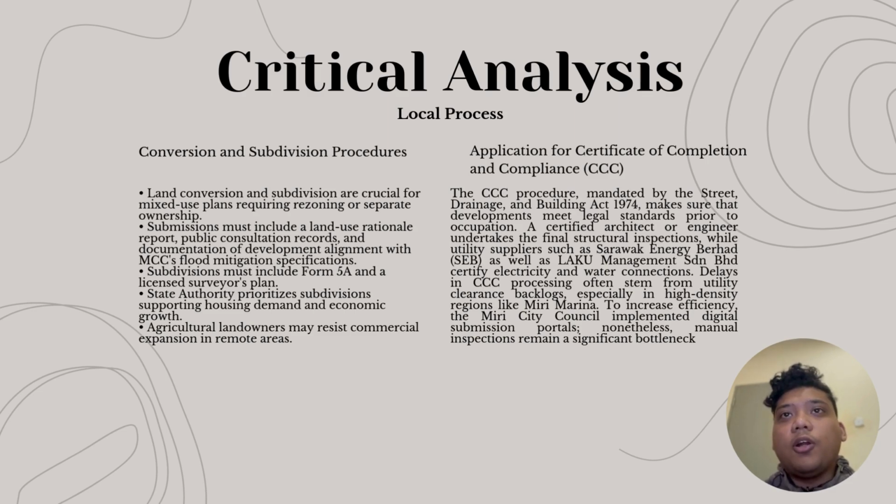And finally is the application for the Certificate of Completion and Compliance, where this procedure is mandated by the Street, Drainage and Building Act 1974, which will make sure that developments meet legal standards prior to occupation. A certified architect or engineer will undertake the final inspections, while utility suppliers such as Sarawak Energy Berhad (SEB), as well as Lambir Management Sendirian Berhad for Miri, will certify the electricity and water connection respectively.